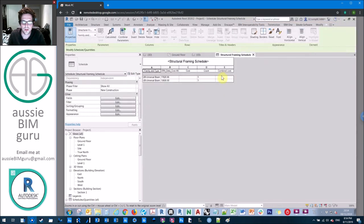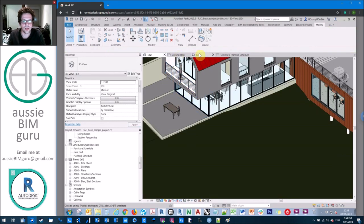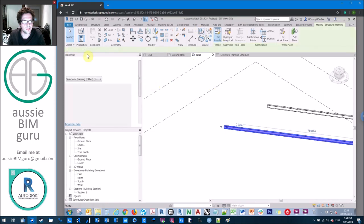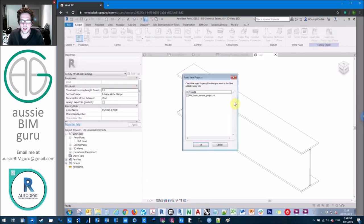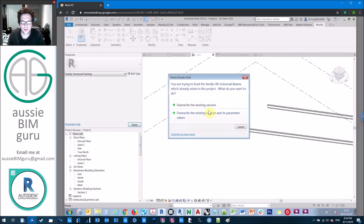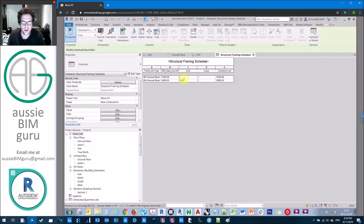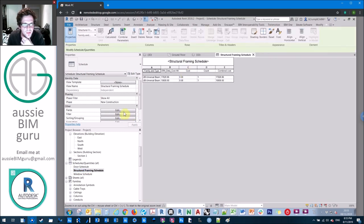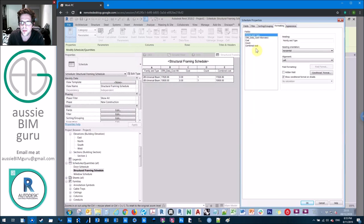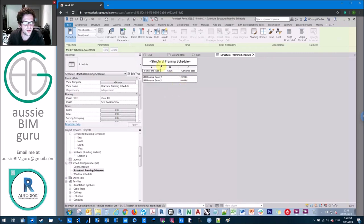Notice that combined cost is empty — you need to set the cost parameter to zero. For a family that's always using its alternate cost, go into the family and in its formula for cost just lock it down to zero. That will always make that field zero no matter what. Once back in the structural framing schedule, there we go — combined cost is showing. Then you can hide your two separate cost fields under formatting and all you see is your combined cost.